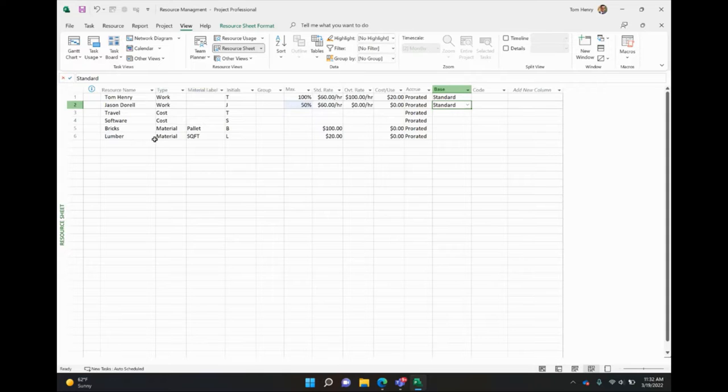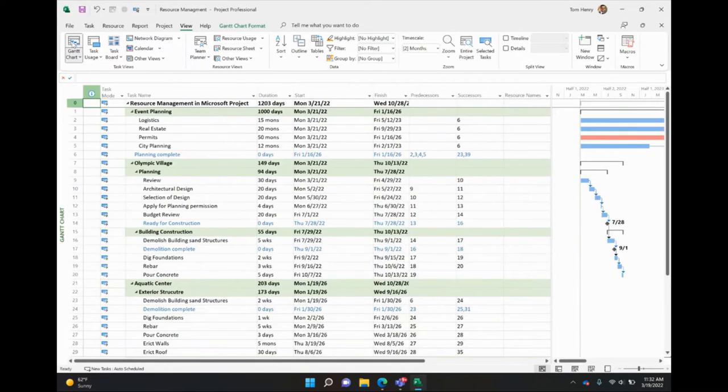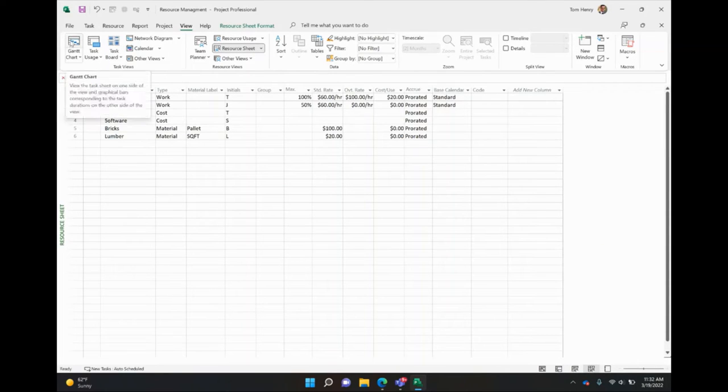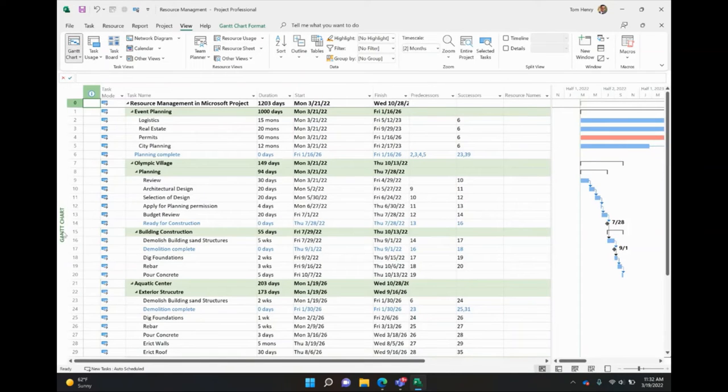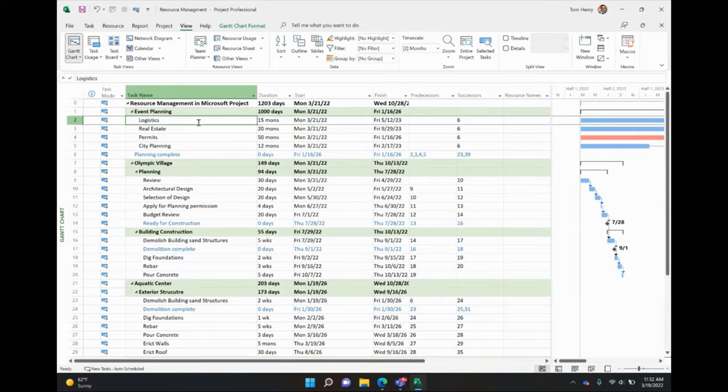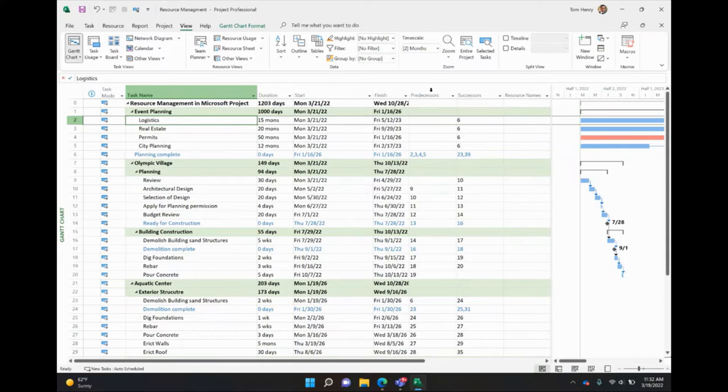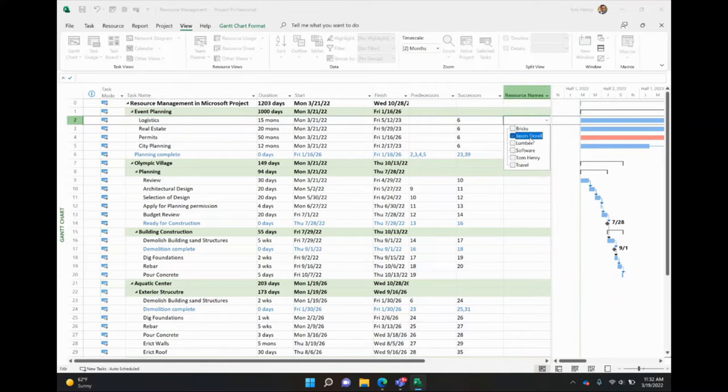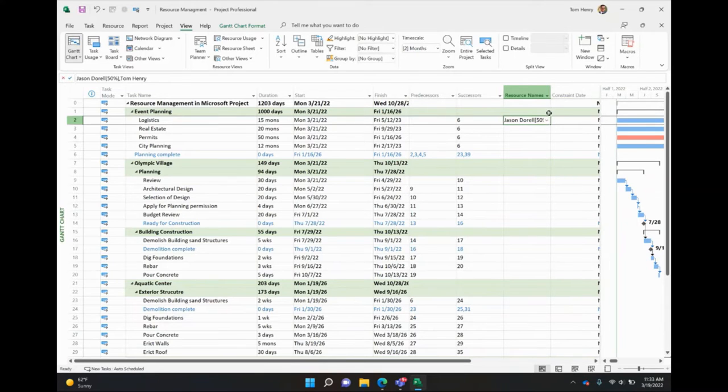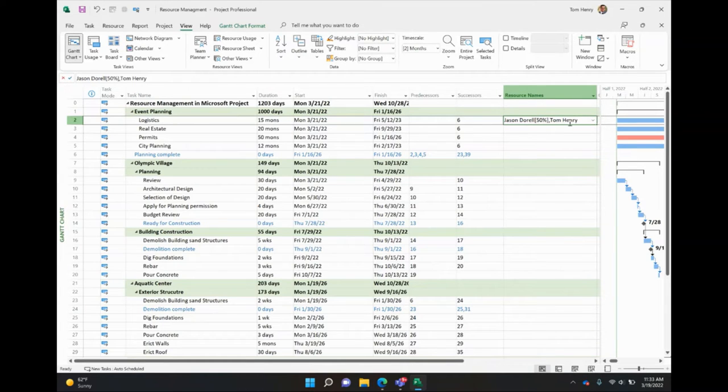So we've got our resources, the three different types. Next thing I want to do is show you how to start assigning those resources to the tasks within your project. To do that, I'm going to go back to the Gantt chart view. That was the resource sheet view I was previously in. We're going back to the Gantt chart view. See resource sheet, Gantt chart. So there's three different ways to assign the resources to the tasks on your project. I have other videos on this as well that gets into more details. But the quickest and easiest way is to just come in to the resource names column, use the drop down, and you can see all the people here. I'm going to assign Jason and Tom to this one task. Boom, done.